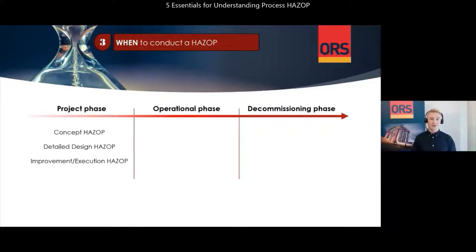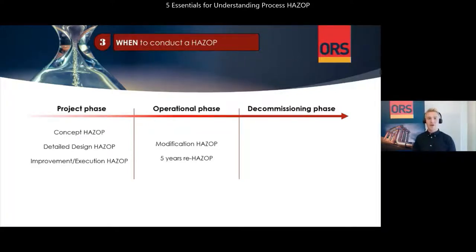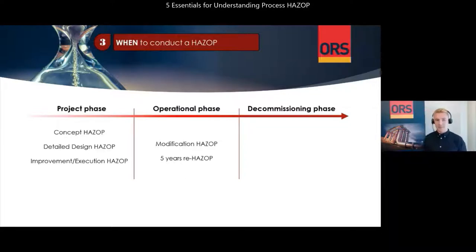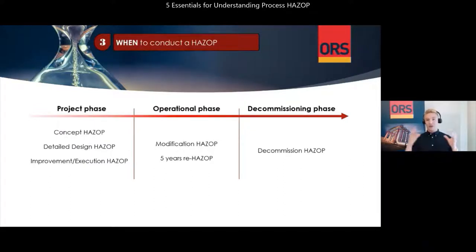A HAZOP can also be executed during operations in case of modifications that may affect the operating envelope of the process design. Or in some cases, such as Norwegian oil and gas requirements, a re-HAZOP every five years to capture lessons learned from operational experience and evaluate if the design assumptions are still valid. In addition, it ensures that emergency and operating procedures are reviewed and updated as required. A HAZOP can also be completed close to decommissioning to ensure the safe removal of parts of a process system or the entire system, and these are quite similar to modification HAZOPs.